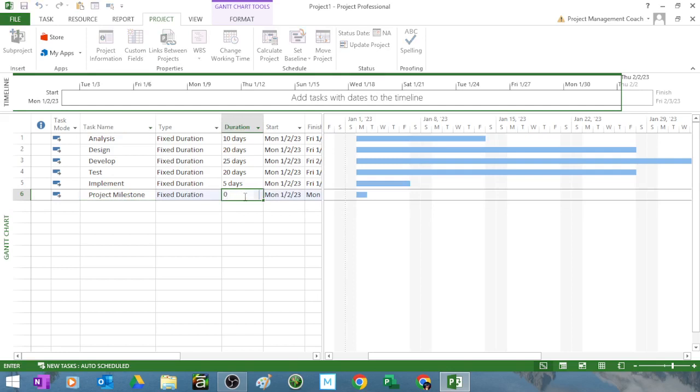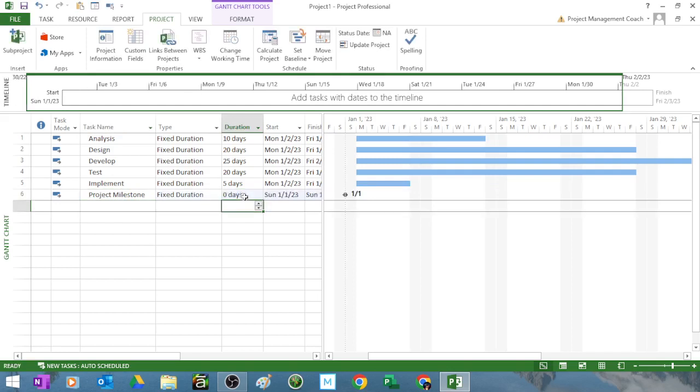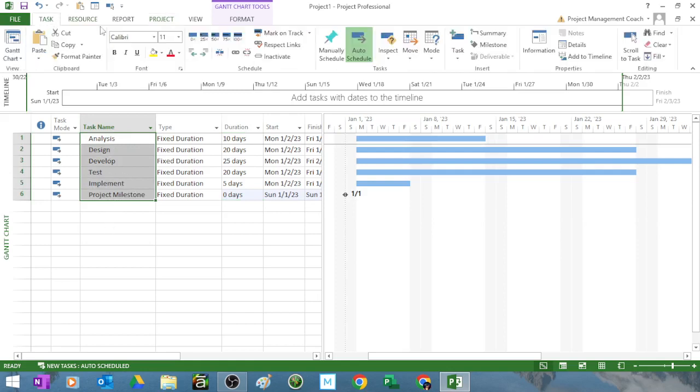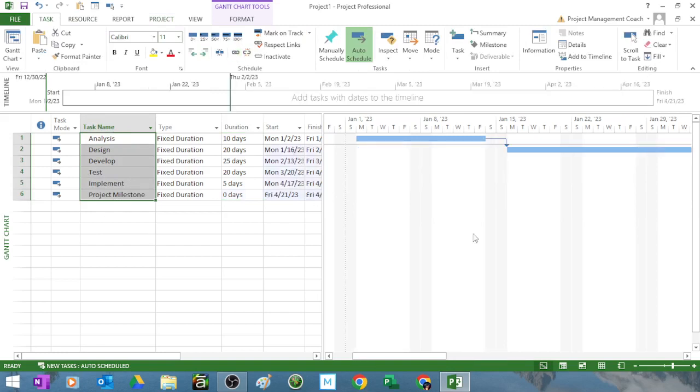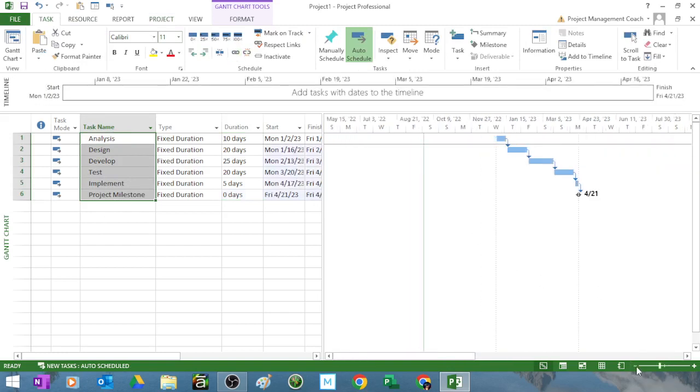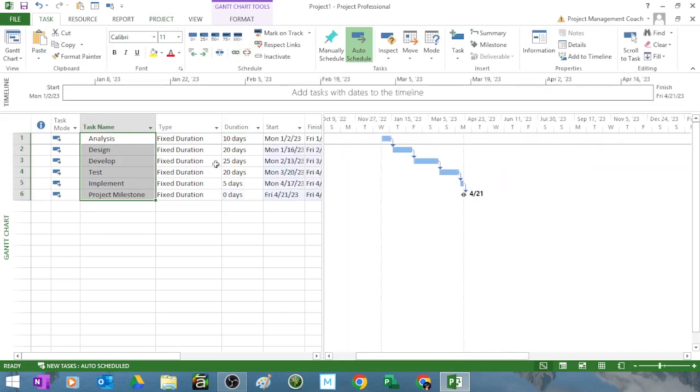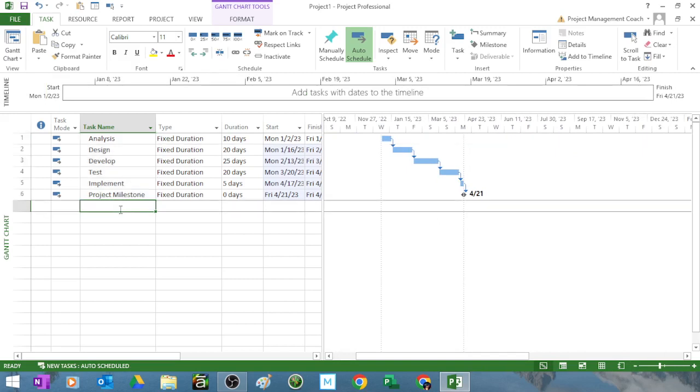So I put in a zero for the milestone. Now if I was joining them, just click, drag down, and then go to task and you can link them in a finish to start relationship. And that's the project. It's that simple.